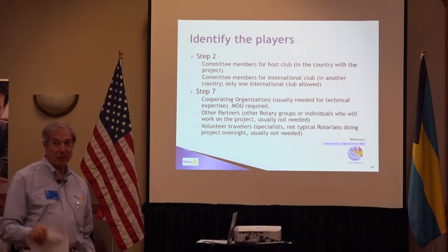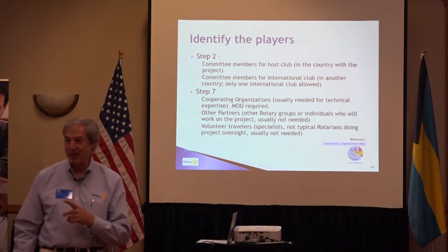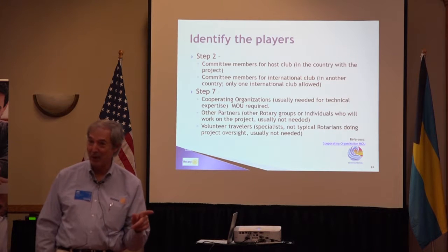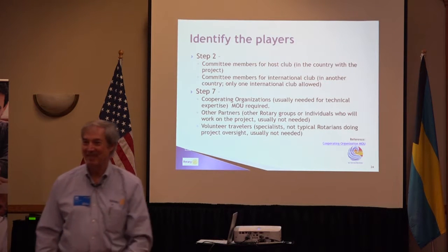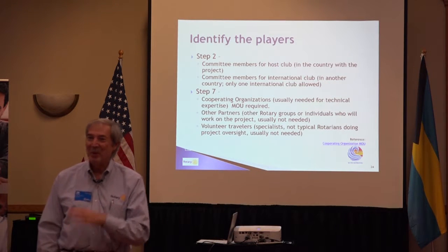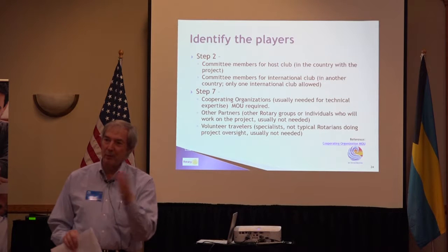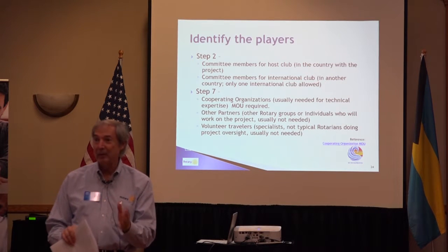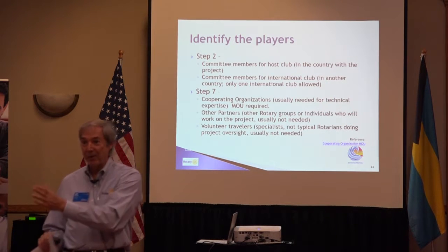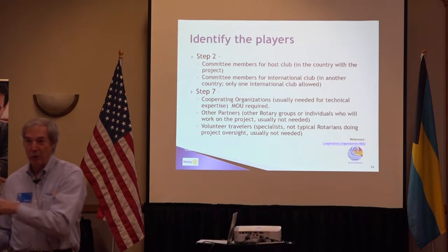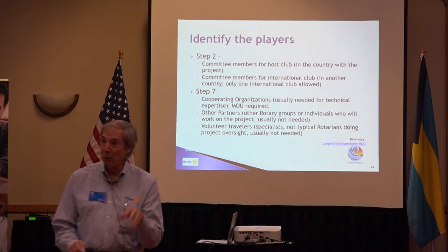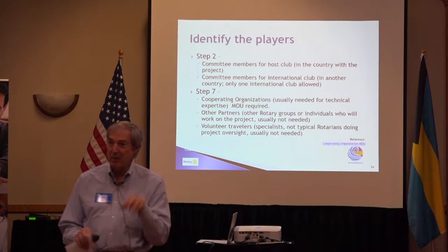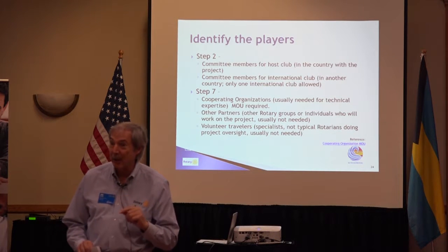Well, two things. There's two things. One is he has to be competitively priced. A guy who comes in and says, "Hey, I know how to drill these things, and I promise I'll give you the best price," right? Okay, that's not good enough. You would have to show that he may be the only one in town, but if I go to another town, there's a guy, and he would do the same well for this price. I'm getting this price or better, and so I've got enough bids to be able to say, I know I'm getting a good price. All right.